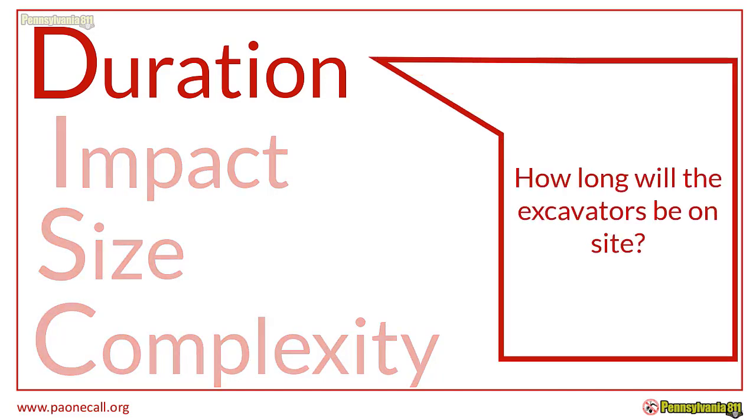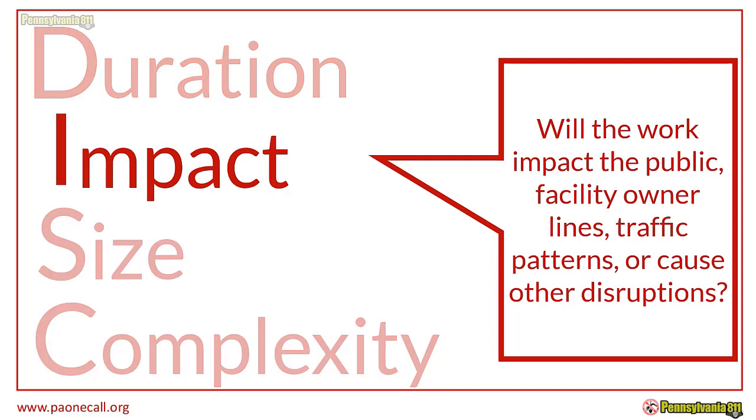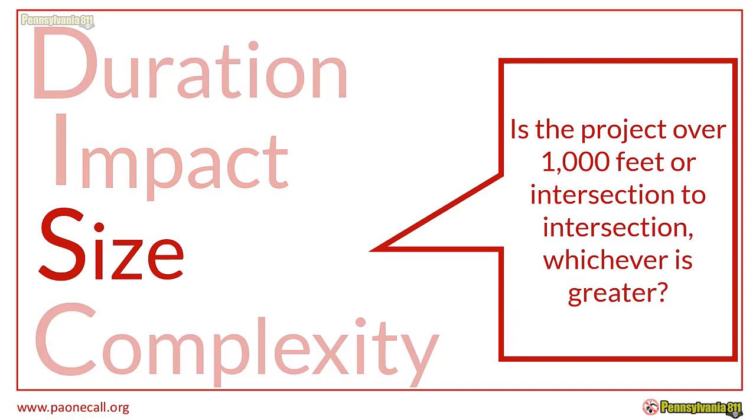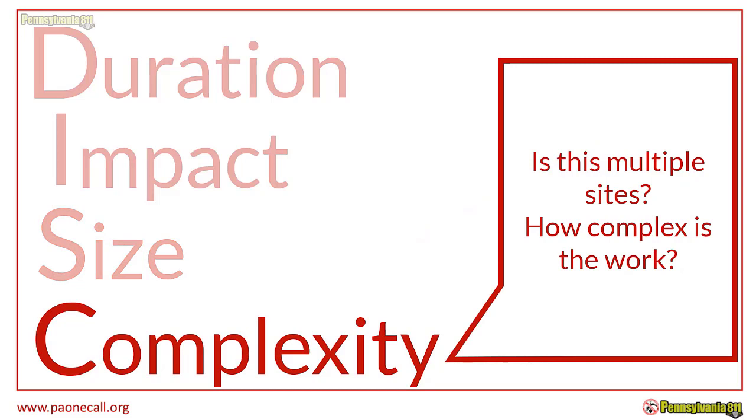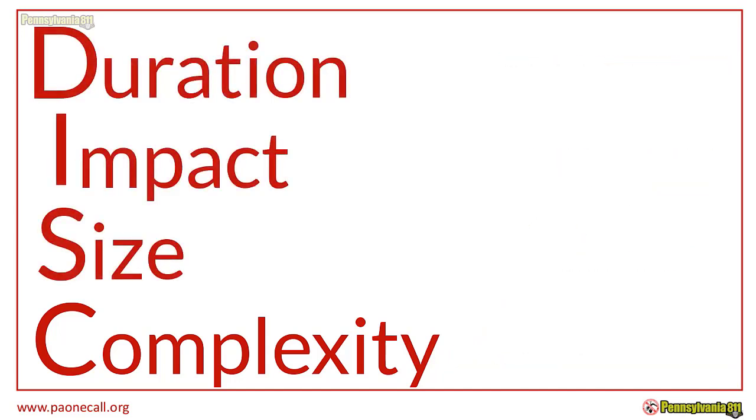Duration. How long will the excavators be on site? A day, a week, a month, a year? Impact. Will the work impact the public, facility owners' lines, traffic patterns, or cause other disruptions? Size. Is the project over 1,000 feet or intersection to intersection, whichever is greater? Complexity. Is this multiple sites? How complex is the work? Your job fits the description and should definitely be placed into CPA as a complex project.